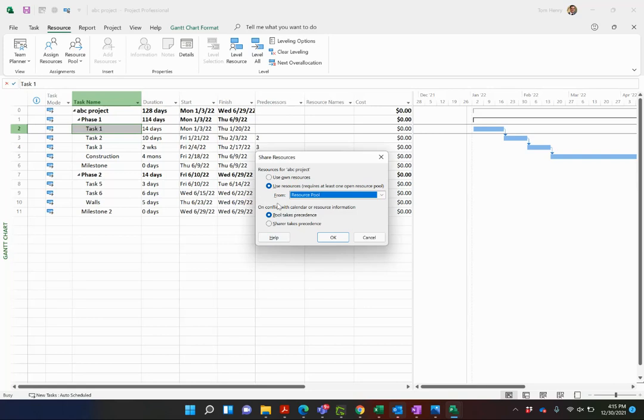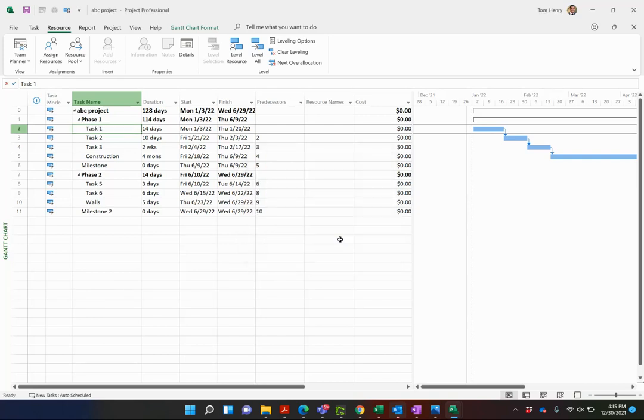Now you have an option. If there is a conflict, somebody in one of the projects opens it up and changes something or pushes somebody around, do you want to override the pool or do you want the sharer to take precedence? I'm going to say that the pool will take precedence. I always recommend to go with that one. Press okay.